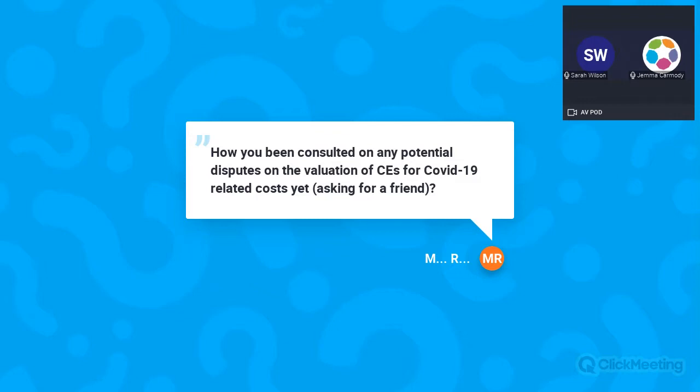What we are looking at are situations where employers give an extension of time and say, this is a COVID delay, and you think, that's very generous. They were very quick to hold their hands up and award it. But when you look into it, the real cause of the delay is something else, typically an employer delay, which would entitle the contractor not only to an extension of time but to loss and expense as well.